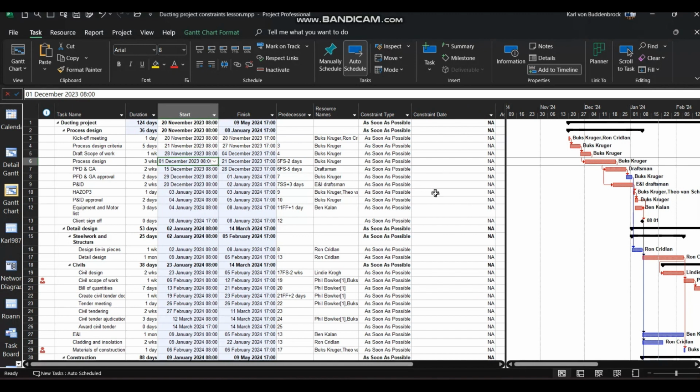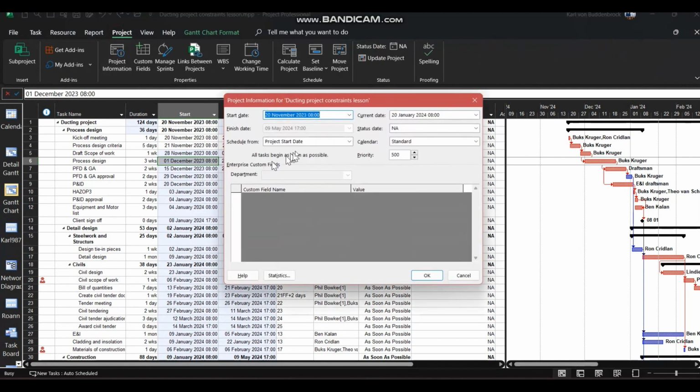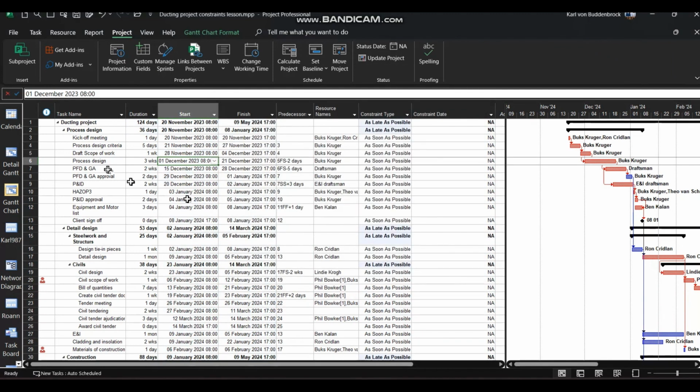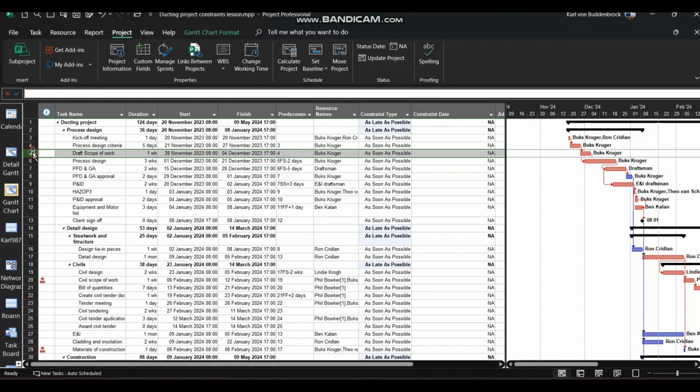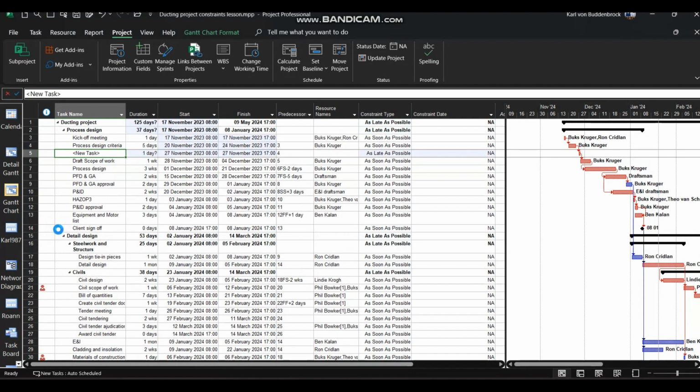But now watch this. If we were to go to my project and set all tasks going forward to be scheduled from project finish date, watch here, and I were to insert a task there, notice, as late as possible. That task, let's say, check implementation, and I've got that at 1 day, and it is as late as possible.